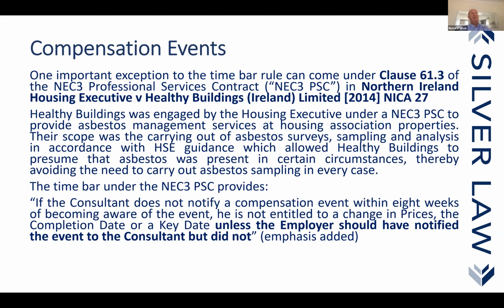So in January of last year, we've signed this contract. Thereafter, immediately COVID hit. So the first thing is, as of January of last year, we didn't know anything really about COVID. There had been a couple of bits on the news that there was this problem in China, but everybody, including the government in the UK, no one was concerned. So we were slightly aware of it, but there's nothing I as a contractor could do, and there's nothing that the employer could do about the effects that COVID has now had, and neither of us knew it was a problem. So we've now met that requirement.